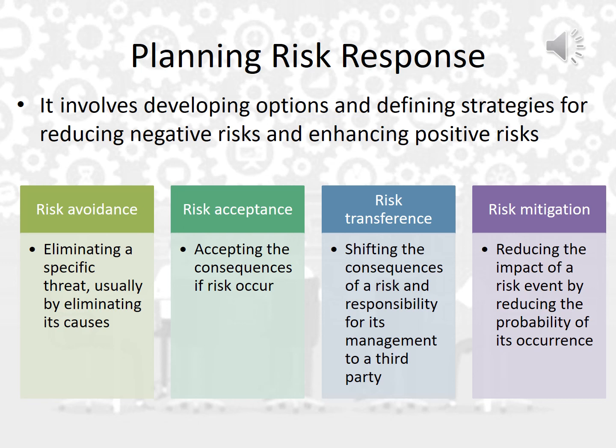I will take a warranty, 1 year maybe, or an international warranty for 2-3 years from the buyer, in such a way that if anything happens to that hardware, the buyer or the shop or the company who sold it to me is responsible for fixing the damage or replacing it in case something happens. So this strategy is called risk transference.